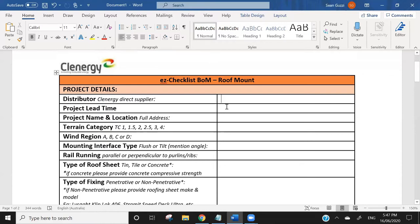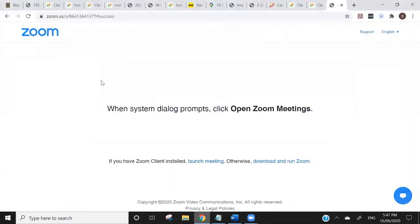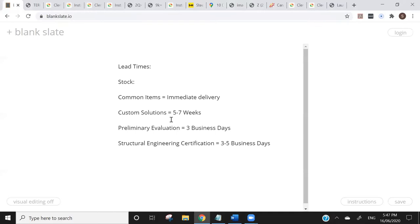The next thing they're going to ask for is project lead time. There are a number of reasons this is important. The first reason is stock. If you come to us and say the project needs to be installed in two to three weeks, then we're going to have to be working with products that are already here in the country. The general lead time on products locally — either through your wholesaler or through one of our warehouses in Australia — would be generally immediate. We carry a lot of stock, with warehouses in Melbourne and Perth.